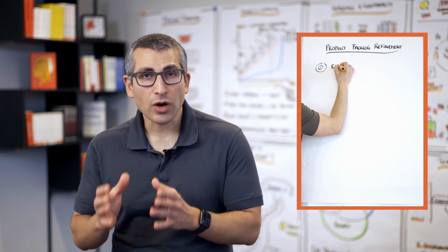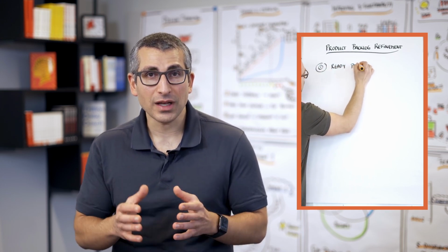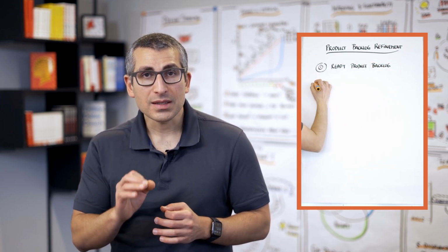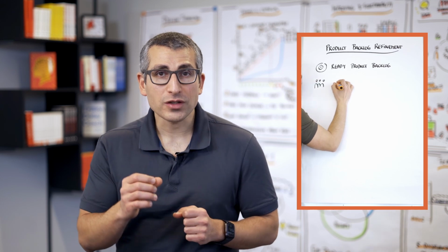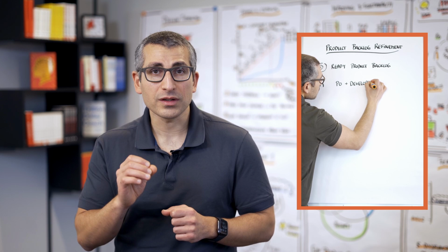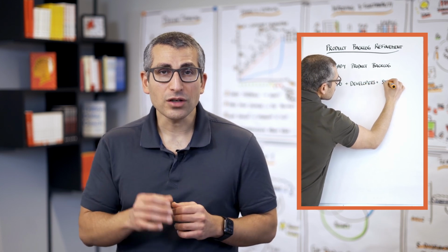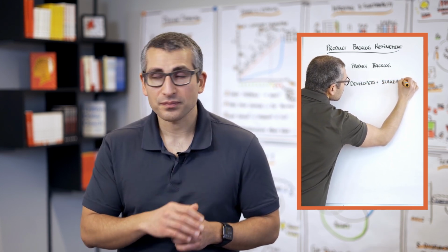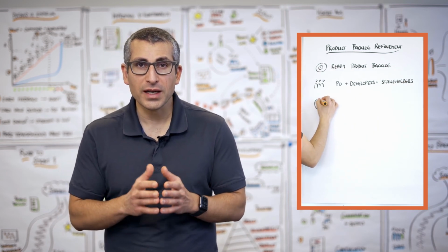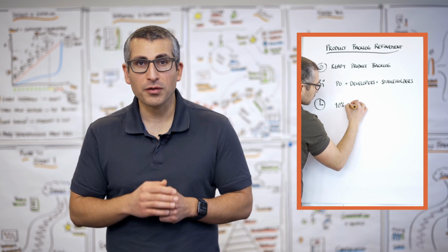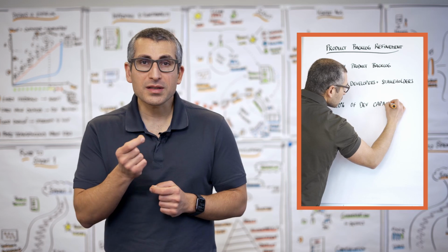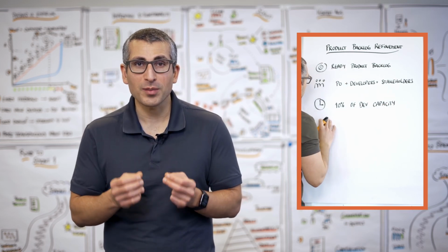This means that a product owner and the developers get together and work through the product backlog one by one. Sometimes it is recommended to also include some of your key stakeholders, as they might provide really important input. As a Scrum Master, you can facilitate that event. The Scrum Guide recommends the developers to block out 10% of their capacity for product backlog refinement activities. It specifically talks about developers because a product owner is basically doing refinement all the time.